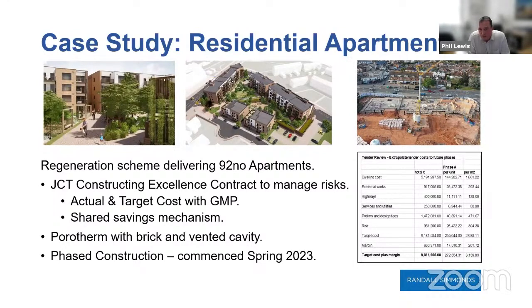They've had to look at the risks up front and discuss with us what those risks were, but also we've allocated those risks to the right people, and we've discussed mitigation much earlier in the process and much more openly. So that's a procurement change in order to get to a place where we could contract.